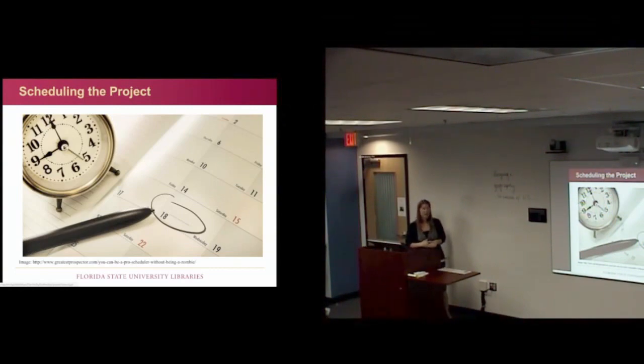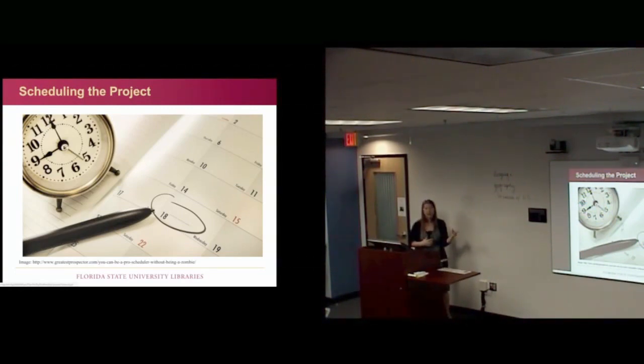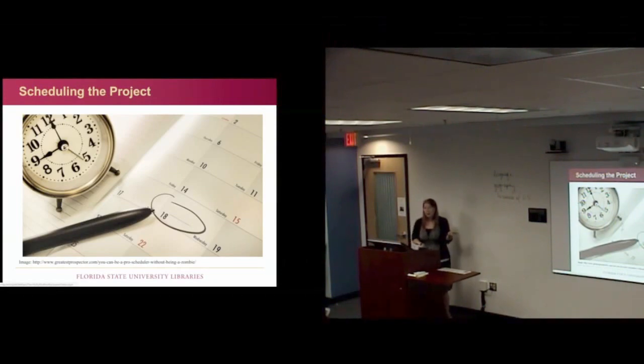Also in the DLC, what I can start to take into account at this point is what equipment we're going to use. What scanner is required for this particular project? Is it already lined up for 3 other projects ahead of it? Is someone in the DLC going on a 3-week vacation? That kind of stuff you have to start to think about when you're thinking about how many hours you're talking about. You start to think about the resources you also have for this particular project.